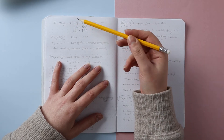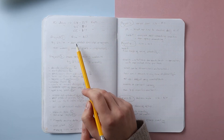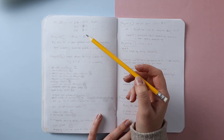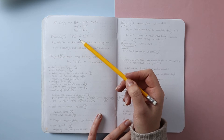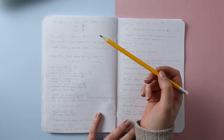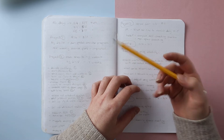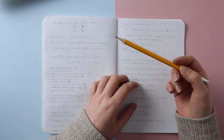The span of the 90 days runs from the 11th of April to the 3rd of July. I then went through project by project and wrote down the dates I'd be doing them. Most of them run for the whole period, but not all. My first project, the exercise program, actually starts a week later because I wanted to wait until six weeks after my surgery date before increasing anything. For that project I just have the first week to plot out the graded exercise program week on week so it gradually increases, and then for the ten weeks after that I simply implement the plan for each week.